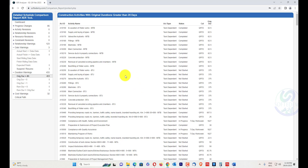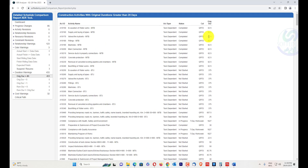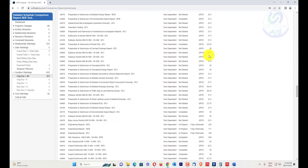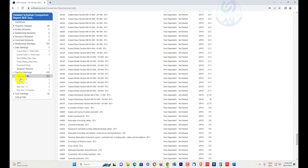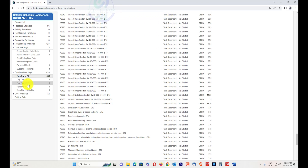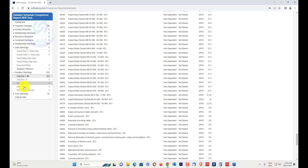Duration warnings flag activities where the duration is greater than 20 days — this schedule has 433 activities with higher durations. You can see original duration, actual duration, and activity duration and copy the data to Excel. Activities with original duration equal to zero, original duration equal to one, remaining duration equal to zero, and cases where actual and remaining durations are equal are all flagged here.